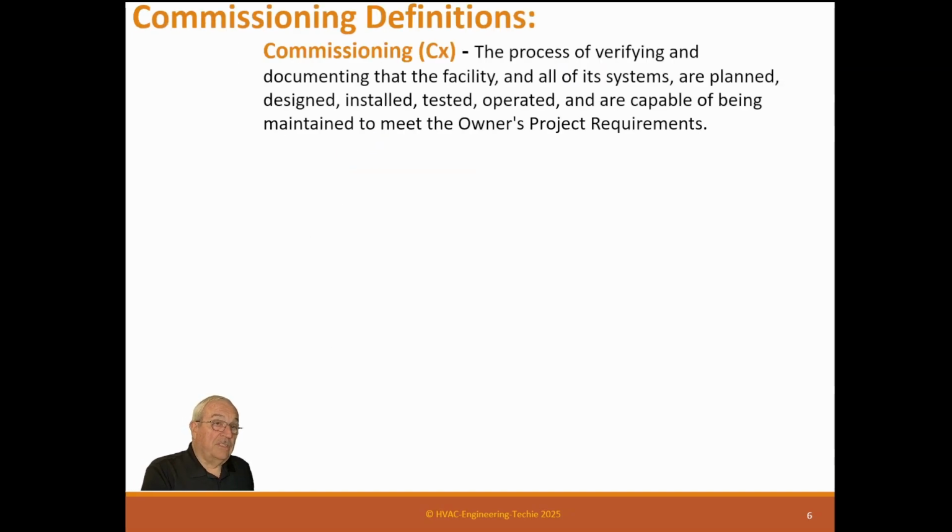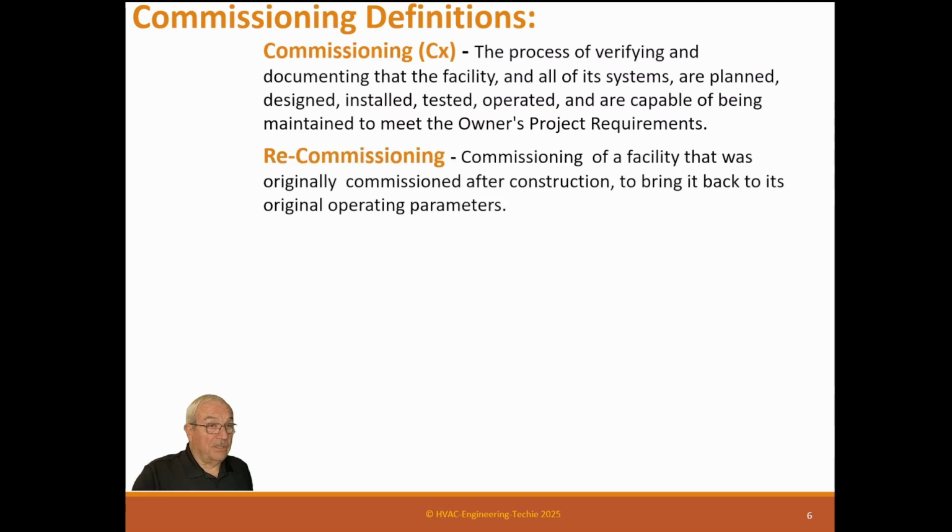So here are the definitions. Now, these may not be everybody's definition, but these are the definitions I've come across, having worked in ASHRAE, having worked in NEB, having worked in different areas in engineering and contracting, and all these different businesses I've had. We've developed these over the years. Commissioning: the process of verifying and documenting that the facility and all its systems are planned, designed, installed, tested, operated, and capable of being maintained to meet the owner's project requirements. And that's pretty much it. Whatever the OPR says, if you can deliver the OPR, you've done a great job in a new building.